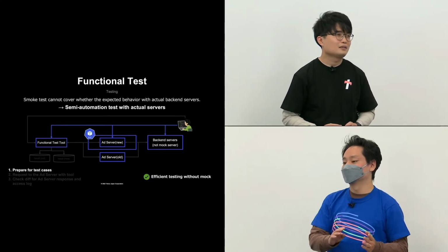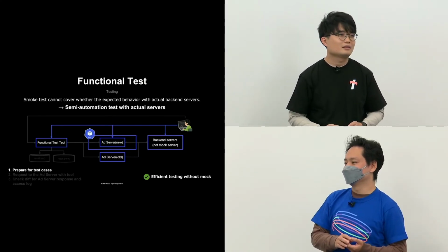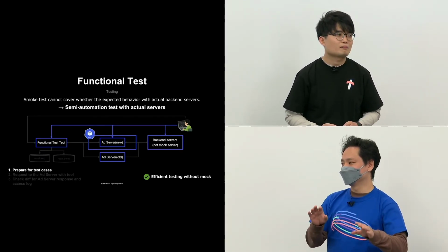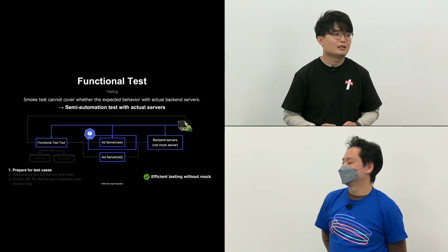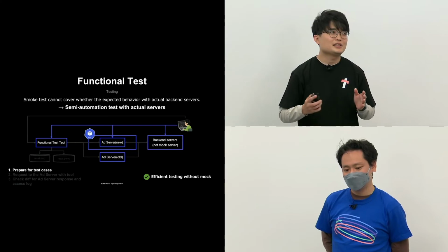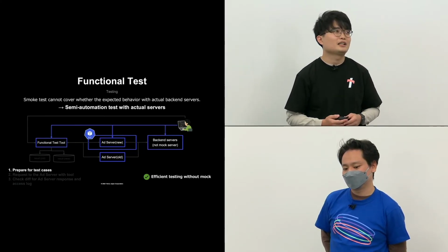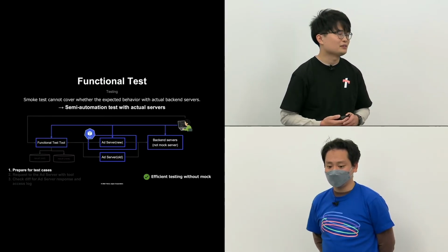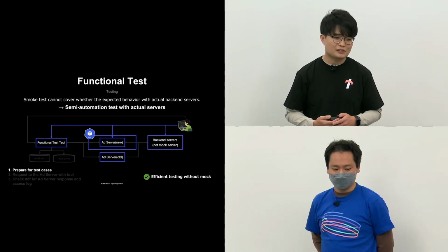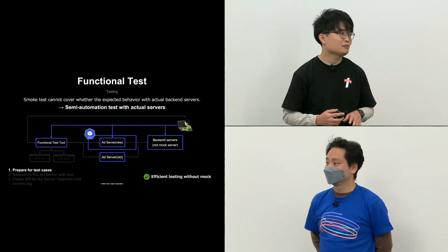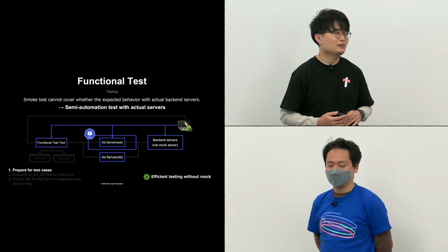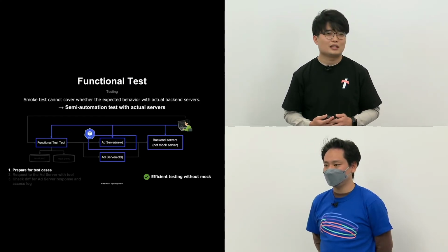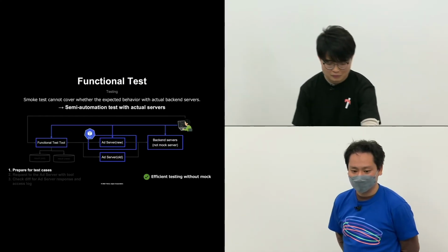So during the development period, what you originally wanted to do, and on top of that, you had to add some functions. Did you have to stop those to work on the new things, or did you work in parallel? For the 18 month period, functional addition projects were less than usual, so we were fortunate in that sense. In fact, we worked in parallel, but in the middle, there was a situation where for about 3 months we had to suspend what we were working on.